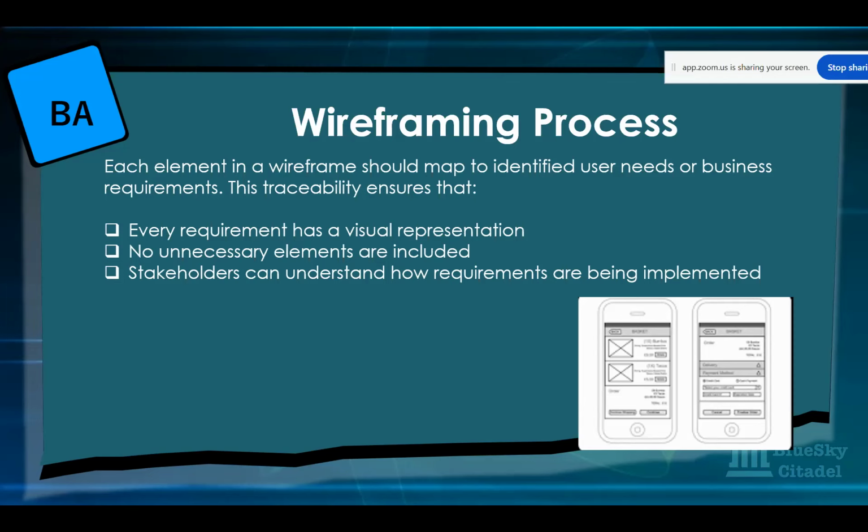I asked if you guys have talked about your definition of ready and definition of done. It would be nice to see it, but that's fine. You should have a definition of ready and definition of done, and your definition of ready should include a wireframe. And that means that if your story doesn't have a wireframe, then it is not ready. So until it's ready, it cannot be committed to sprint.